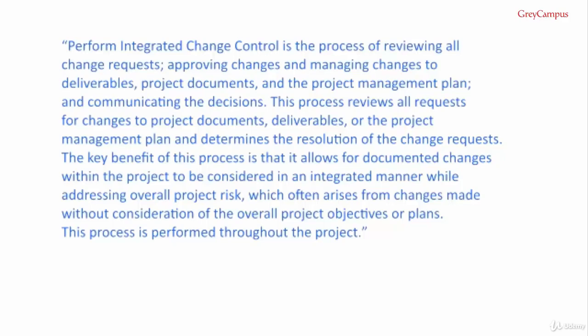This process reviews all requests for changes to project documents, deliverables or the project management plan and determines the resolution of the change requests. The key benefit of this process is that it allows for documented changes within the project to be considered in an integrated manner while addressing overall project risk, which often arises from changes made without consideration of the overall project objectives or plans. This process is performed throughout the project, and that's from the PMBOK Guide, page 113.